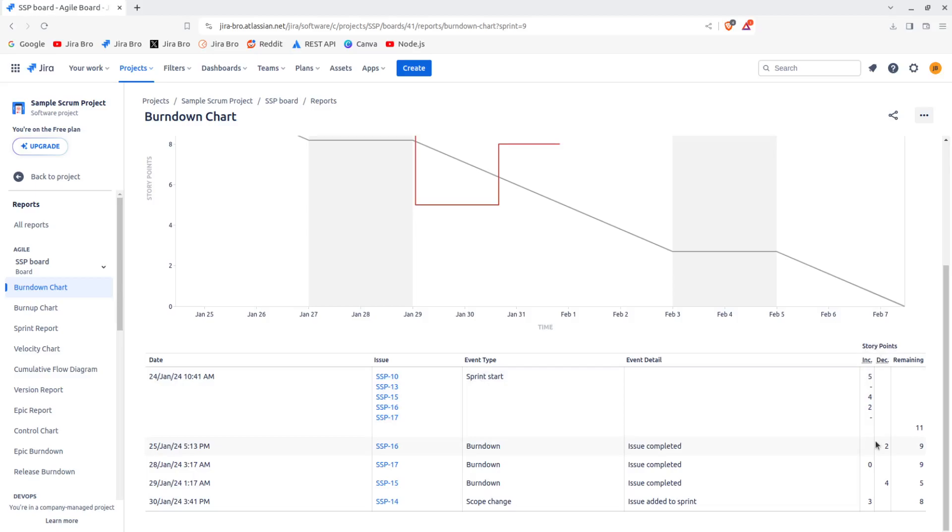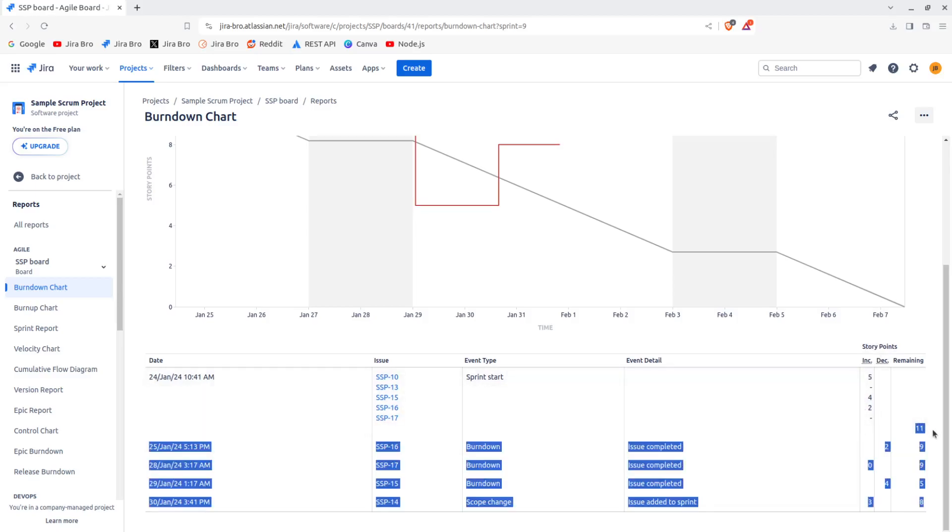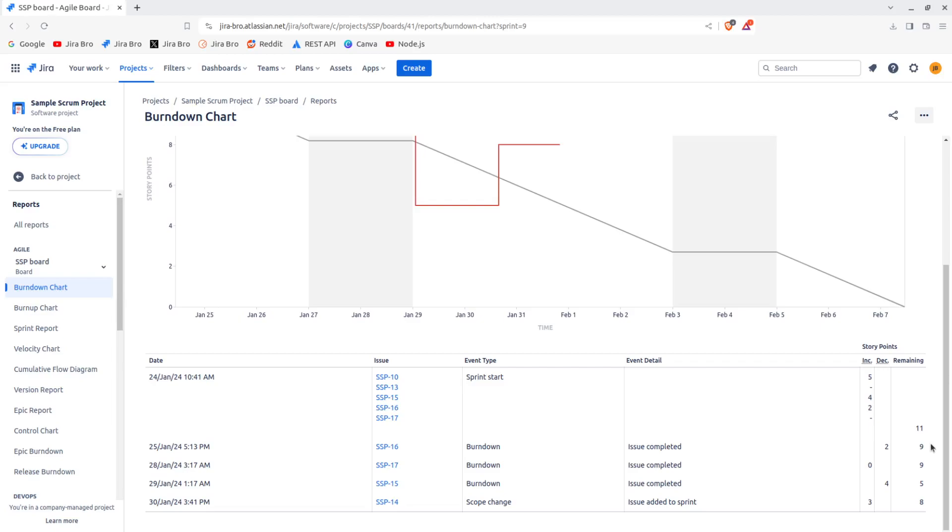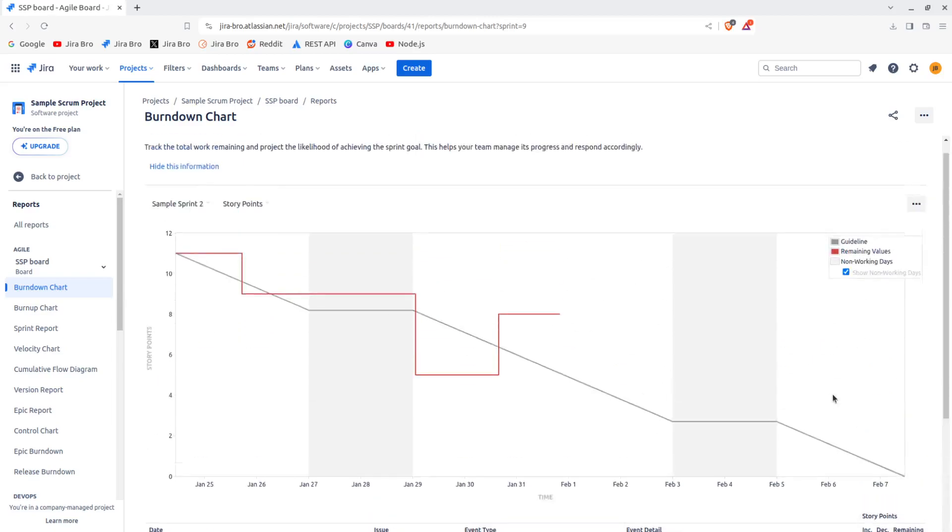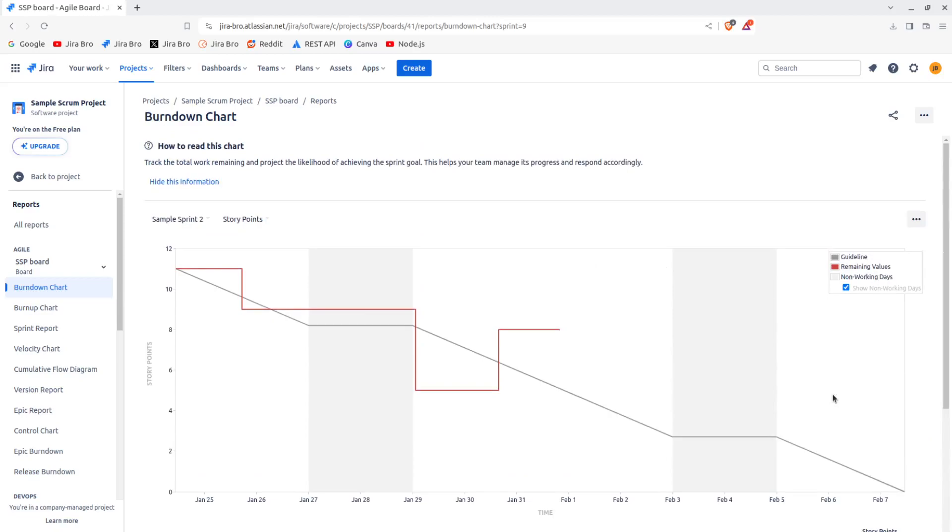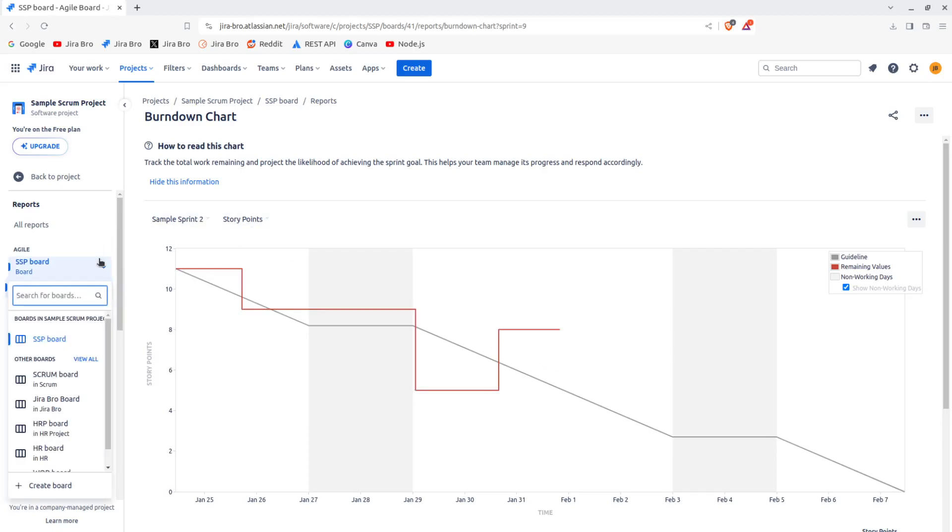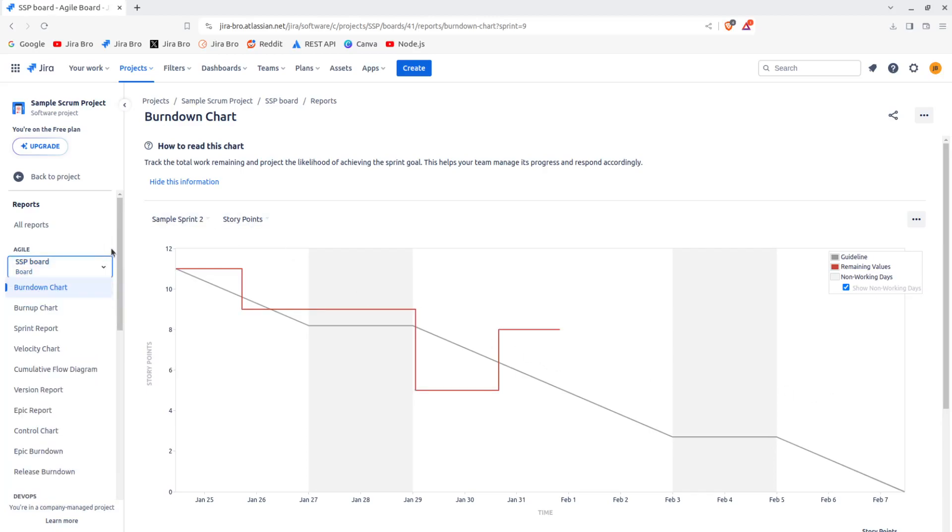And how many of the remaining story points are there. You also have the scope change issue added to the sprint. So when the issue is added to the sprint, there's something called scope creep. This is something that you really want to avoid when you're within your scrum project.